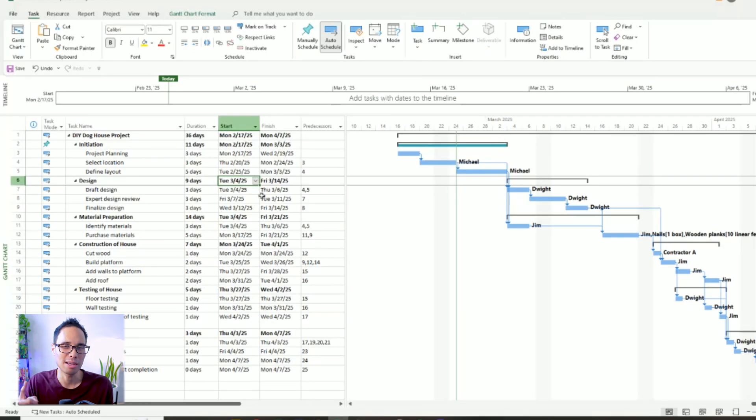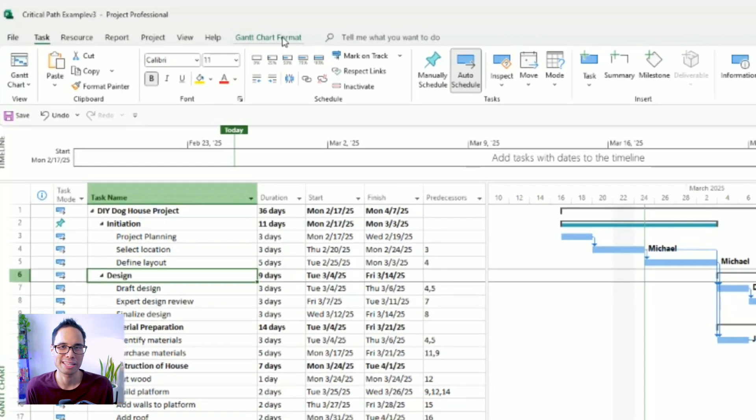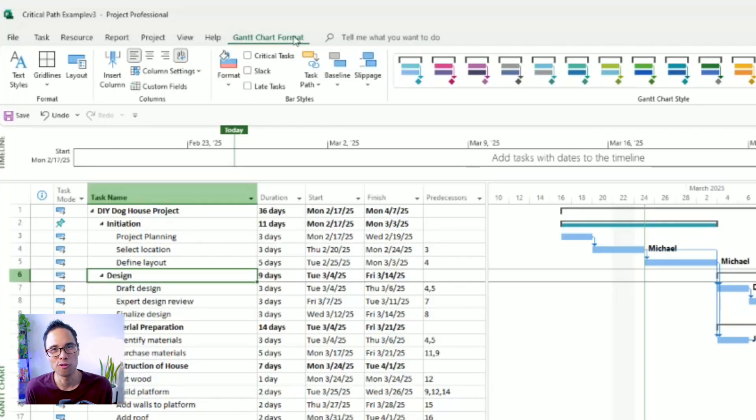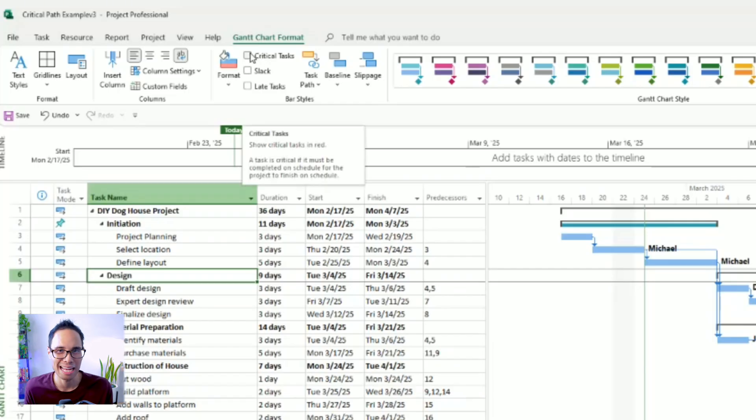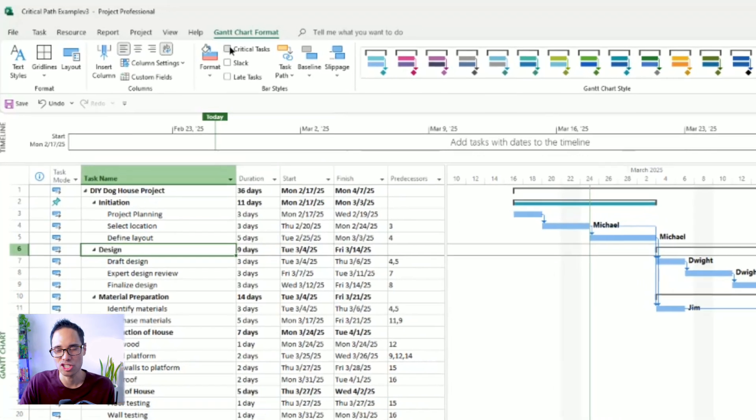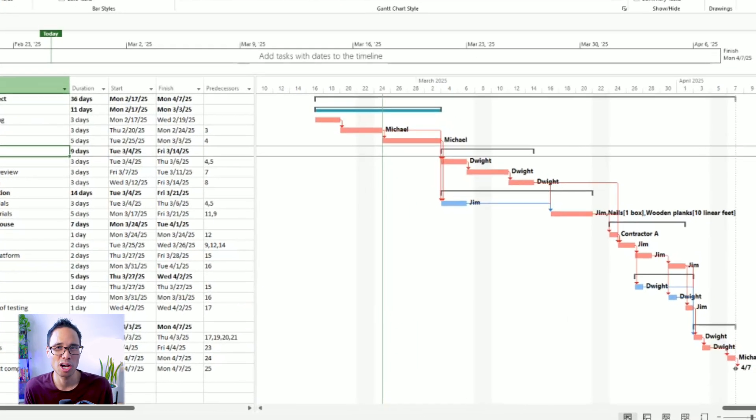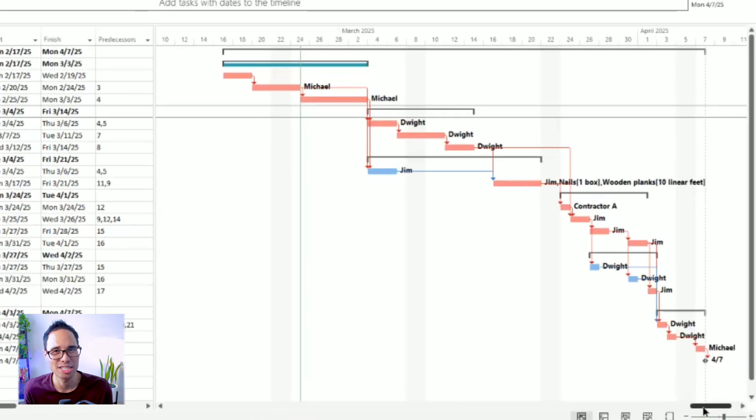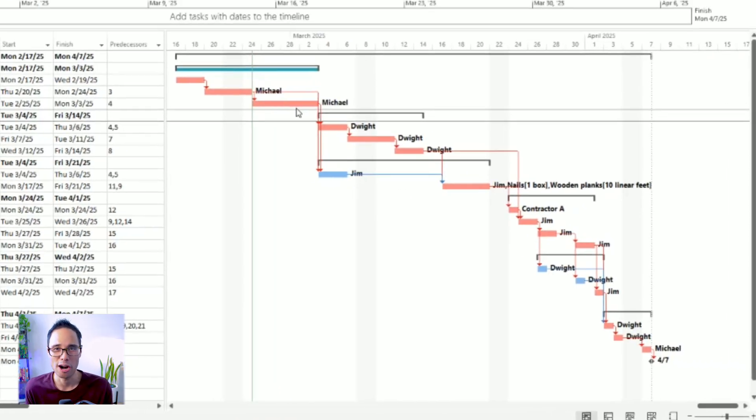With that said, here is the easiest way to view your critical path. On the top ribbon, move your mouse to the top and select the tab for Gantt chart format. Inside the panel for bar styles, check mark the box that says Critical Tasks. On the Gantt chart on your right side, you'll see bars appear color-coded as red. These red bars represent your critical path.